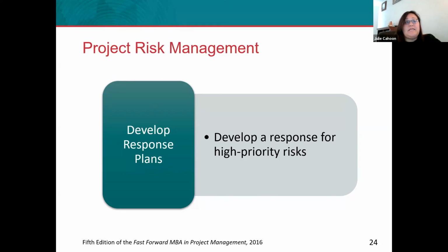If it's something that's unavoidable and something that you can't necessarily mitigate, but the impact is maybe not as bad as it may have seemed at the beginning, and it won't impact your budget, it won't impact the deliverables or the quality, you may want to consider talking to your funder about this particular risk and get their input, and maybe it makes more sense to the project overall just to accept the risk.